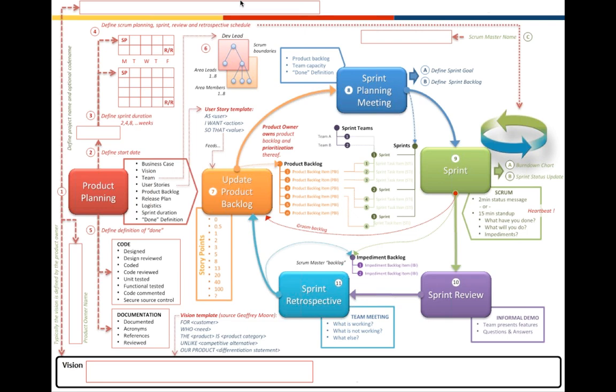While you do that, you also do the estimation. So you do an estimate for every story, and if you are knowledgeable enough, and if you have good experience in Agile, you would be able to use story points. So you're using story points to do estimation, and now it comes to a point where you want to set an initial velocity of the team, which goes back to my previous slide where I was telling how we can set, what are different ways we can set an initial velocity of the team. So you set a velocity, that I'm going to take up 60 story points or 30 story points in the first iteration.